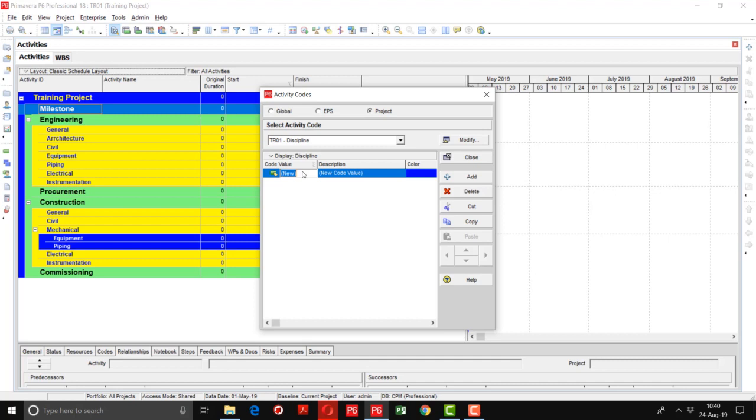So first of all, I'm going to create the code value as M. M means milestone. We have to define some milestones, so I'm going to create the activity codes of milestone as well. Then architecture. In code value you just briefly describe or use some characters to represent, and in the description you can explain with the proper words. Here you can just use the abbreviations.